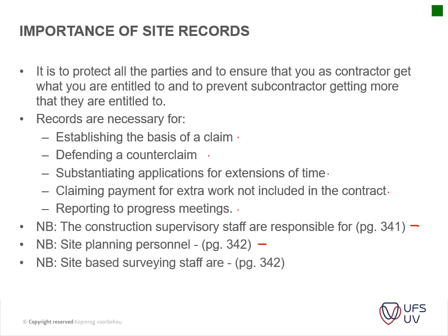Okay, then finally, site-based surveying staff, also on page 344, is responsible for keeping of all site measurements, recording details and measurements of individual variation contracts, the pricing of site day work sheets, correlating instructions received, reconciliation of bills of quantities. Okay.